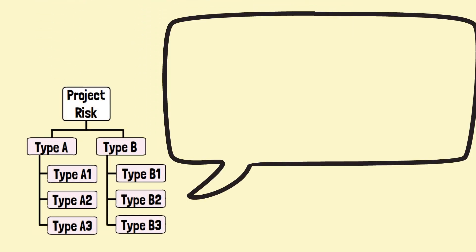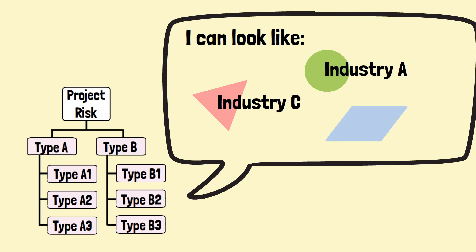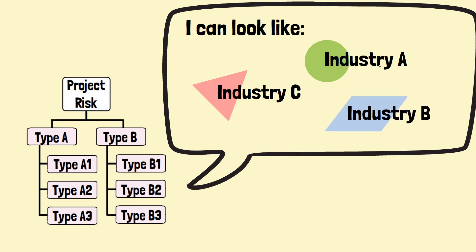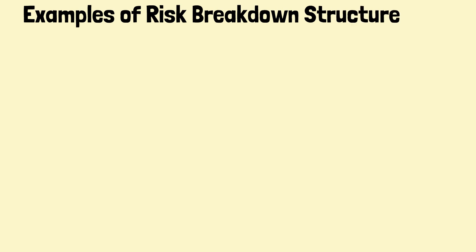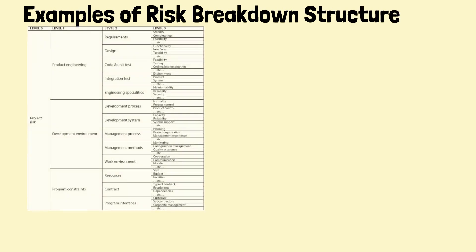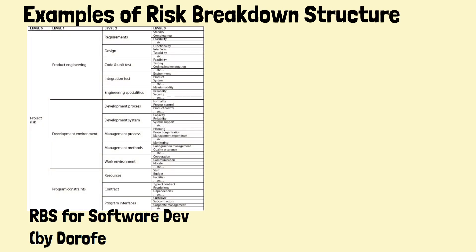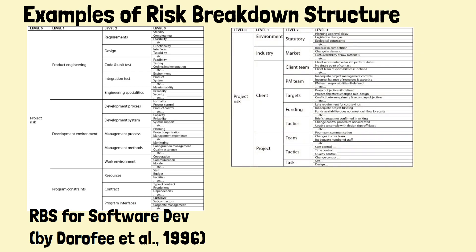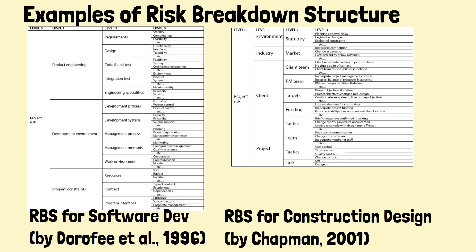A risk breakdown structure can take different forms depending on the industry, and there have been attempts to develop RBSs for different industries. For example, an RBS for software development was developed by Dorothy, and another example is an RBS for construction design risks by Chapman.